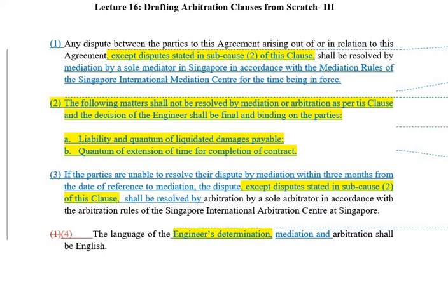Now, for the first item, it says whether all disputes arising out of or in relation to this agreement is sought to be referred to arbitration. Predominantly yes, except for subclause 2 before you. Whether any pre-arbitration procedure is to be followed, and if so, what? Yes, pre-arbitration procedure is to be followed, and that is mediation. And before that, certain disputes are accepted or excluded from the scope of the dispute resolution clause.